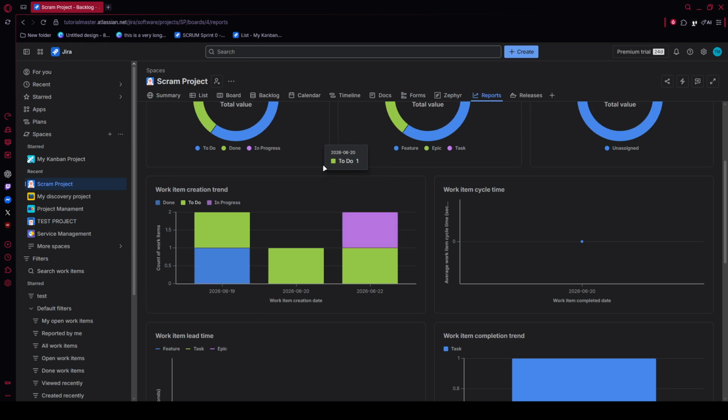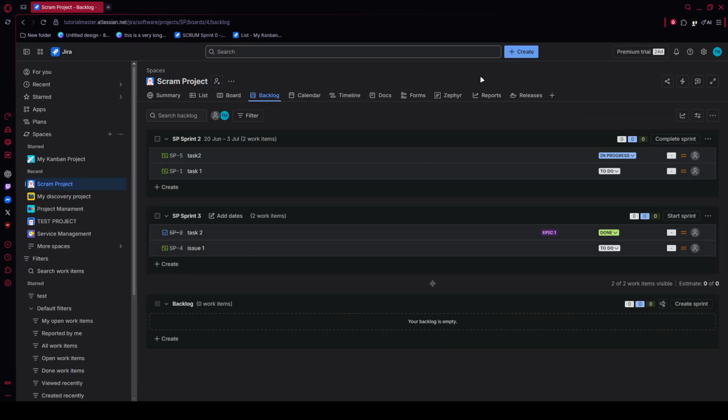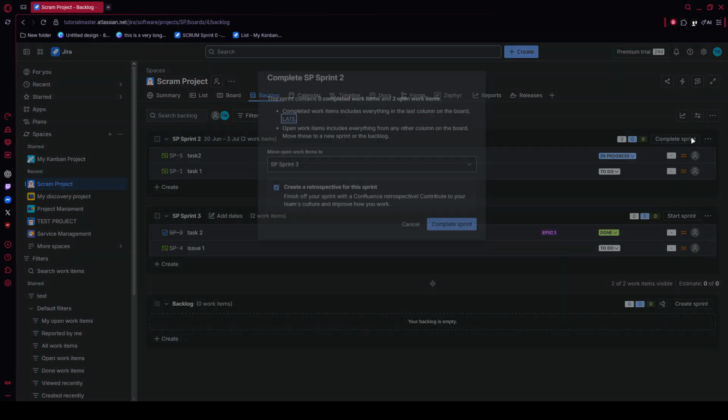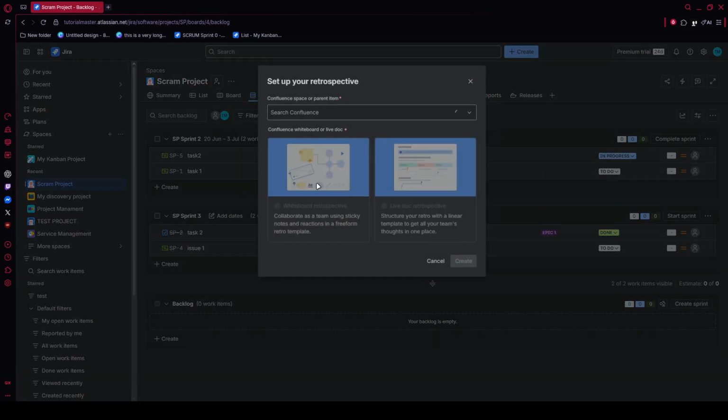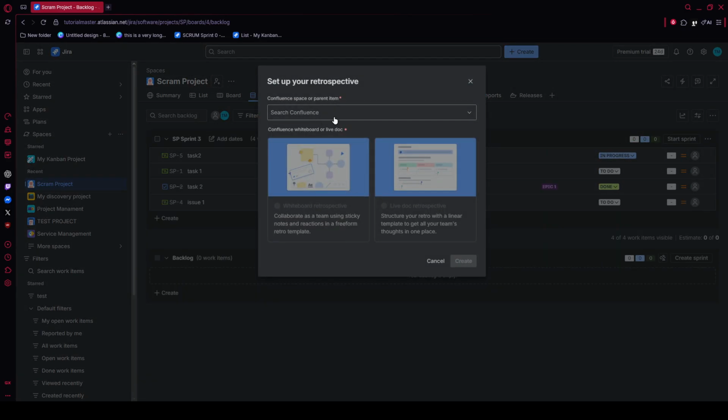Go to the upper left area of the report page and open the Sprint Selection dropdown. You'll see a chronological list of completed sprints. Scroll through that list, choose the sprint you want to review, and click it. As soon as you do, Jira refreshes the report and loads the historical data for that specific sprint.